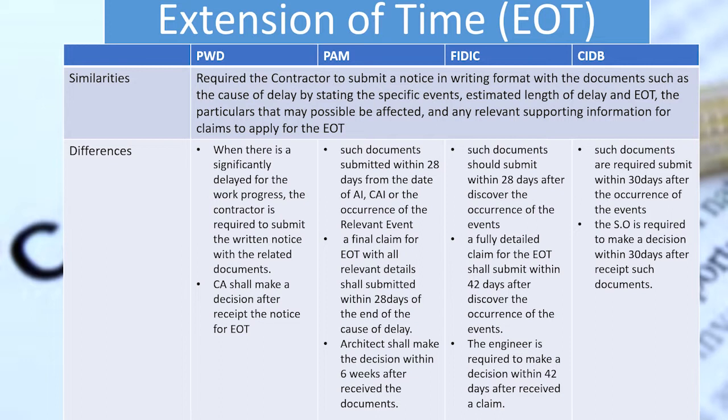For the difference, in PWD, the contractor is required to submit the written notice with the related documents when there is a significant delay to the work progress,